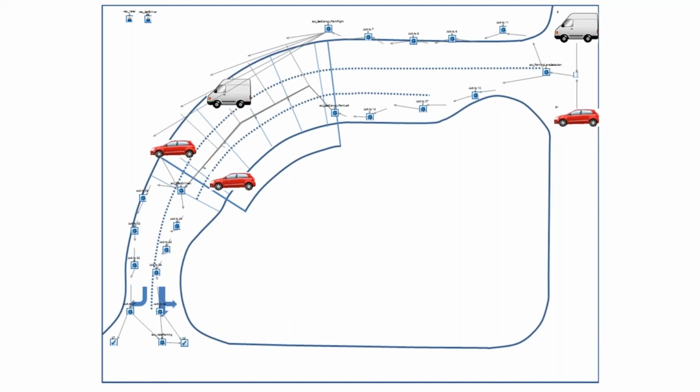Those two really lend themselves to, for those that have worked in a project management perspective, the triangular is really similar to the PERT analysis in a way, where you're having a conversation with your stakeholders, and if you have multiple conversations with multiple stakeholders, you start to be able to form a good distribution that you can get relatively good accuracy out of. So what's the best case scenario, what's the worst case scenario, and what's the most likely?